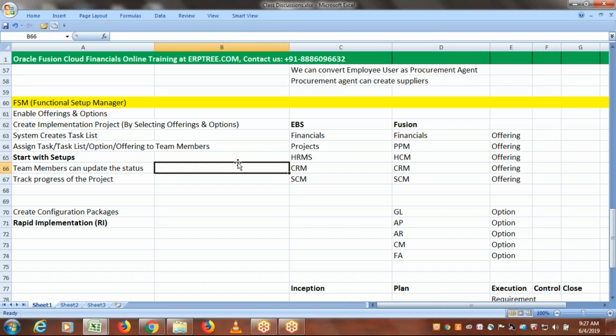So, Lakshman, where is the scope here? I mean, the scope or initial CRPs that we conduct to gather. One second. Scope will never be decided after CRPs and all. Based on the scope only, this is a very known point. The scope means here the modules which you are going to implement. That should be known before starting the implementation.